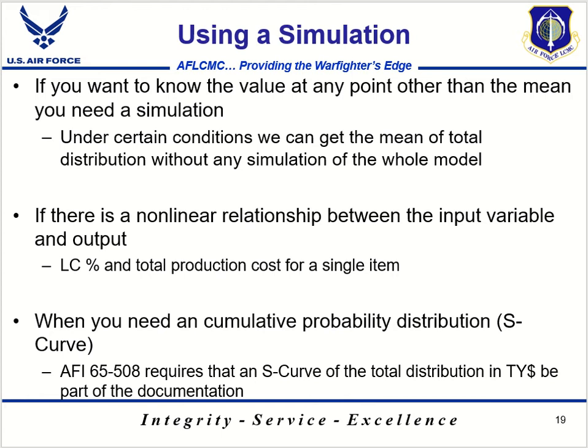As I just mentioned, you may not always need to run a simulation if you're just trying to get the mean value, but in most cases you will need one. Presenting a cumulative probability distribution, or what we call an S-curve, is required for cost reviews and estimate documentation. So it's good to get in the habit of running a simulation. You'll stay familiar with the software that your organization uses, and you'll be able to respond quicker when you do need to run one.